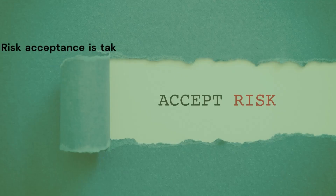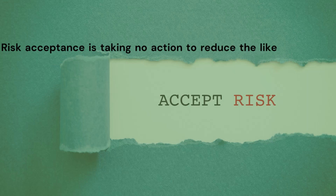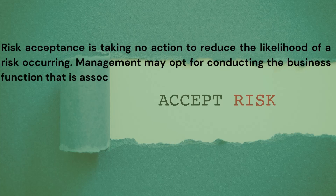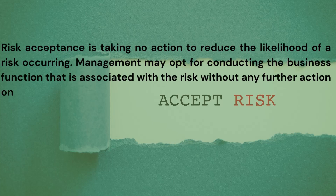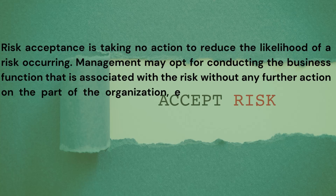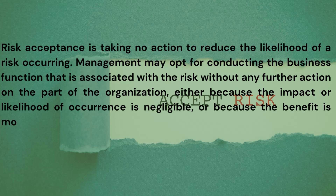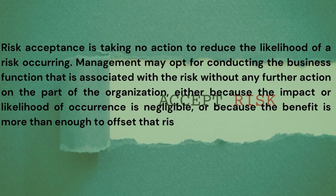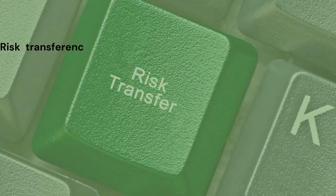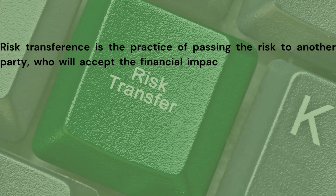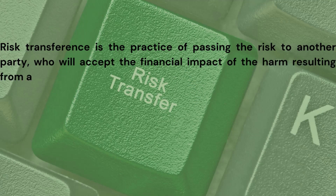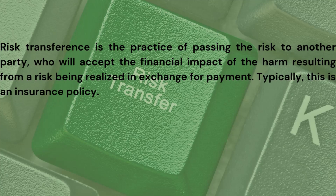Risk acceptance is taking no action to reduce the likelihood of a risk occurring. Management may opt to conduct the business function associated with the risk without further action, either because the impact or likelihood is negligible, or because the benefit outweighs the risk. Risk transference is the practice of passing the risk to another party who will accept the financial impact in exchange for payment — typically an insurance policy.